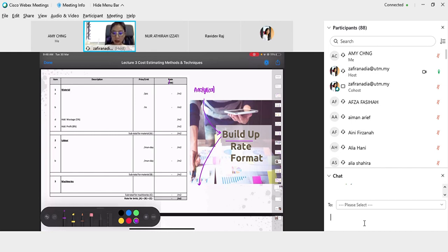But this is based on my experience. So these are the common ones that I have seen a lot of companies using, this kind of format, where you separate the material and then the price per unit. Because I said earlier it is different, you can use meter, you can use man per day, you can use pieces or numbers, according to the requirement of that material or that scope of work. Okay. And then you add wastage and you directly add profit. For material there is profit.